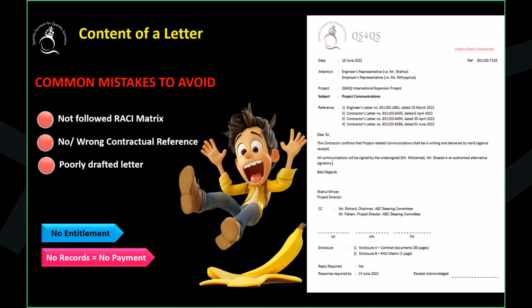So if you don't claim, which is already incurred the cost at site as a contractor, what will happen? It's going to bring the cash flow impact. Ultimately, you are going to go what? Your objective of the letters going to fail. You are not reserving your rights. Okay. If you are not reserving your rights, you are not going to get the money.